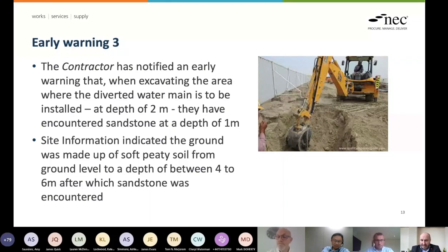We haven't asked for the contractor to do the site investigation, but that seems like quite a sensible move in that if we can do some initial site investigation as soon as possible, maybe dig some trial pits, take some boreholes in the areas, we can get a feel for whether this is just an issue at the bottom of the site or all the way across it. So that seems like a fairly sensible way forward. You all right with that, Paul?